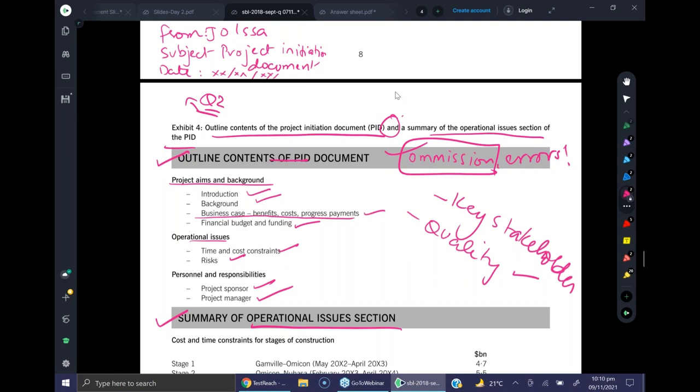Can I also say that there are no assumptions given about weather conditions? So what is the assumption about weather? In the mountains, the weather can go really bad. So how many days will be delayed? So there has to be some assumption about weather condition.